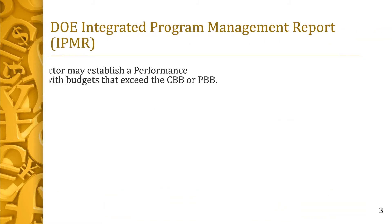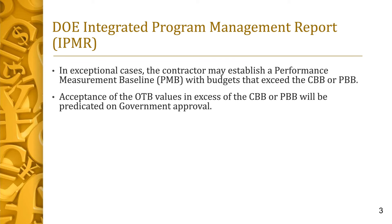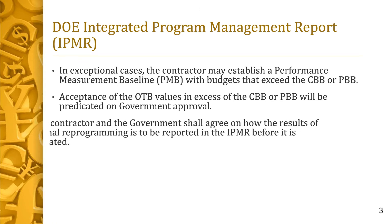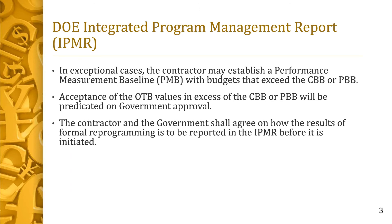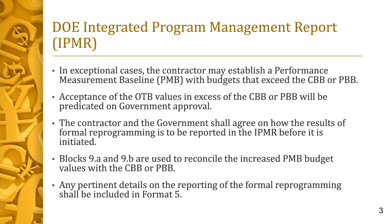The OTB is also part of the reporting requirements required in the IPMR. An OTB is established under exceptional cases and requires government approval. Before this replanning is initiated, the contractor and the government need to agree on how the results will be reported in the IPMR and agree to the values. The IPMR blocks 9A and 9B are used to reconcile the increased budget values to the CBB or PBB. Format 5 is used for the contractor to add any pertinent details of the formal reprogramming.